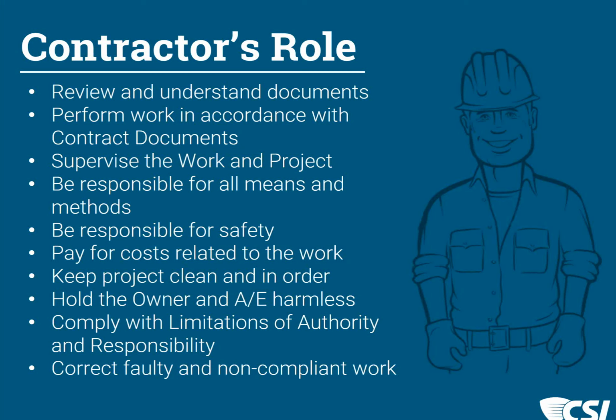And then if there is faulty work or rejected work or perhaps damaged work, they're responsible for removing, replacing, and or correcting that work at the direction of the architect or engineer.